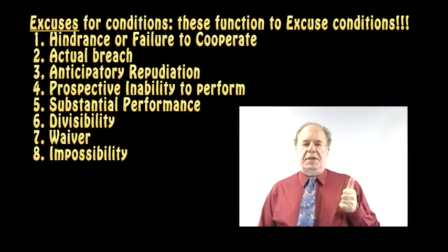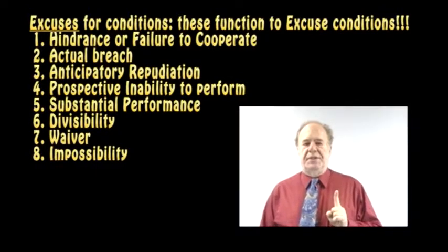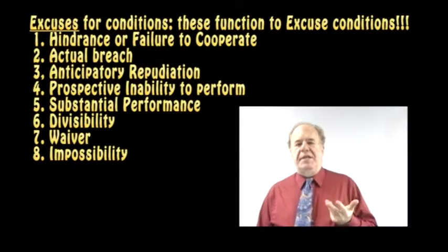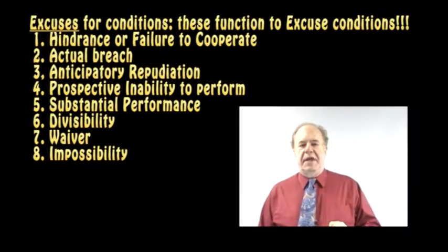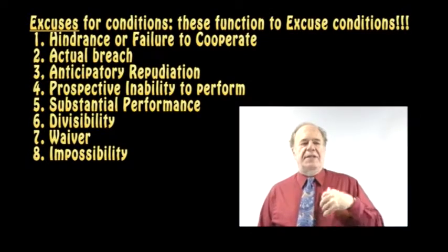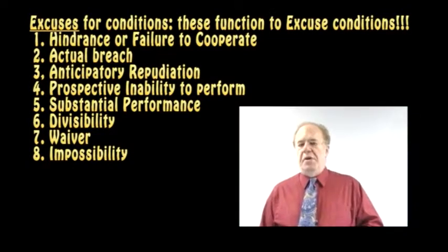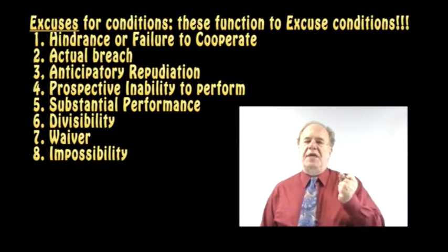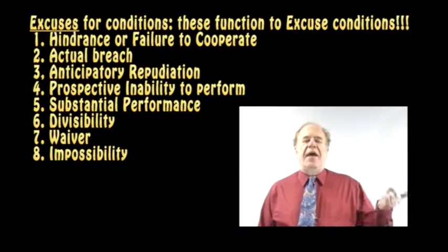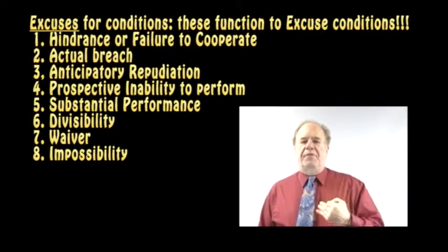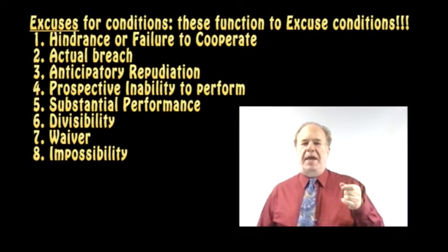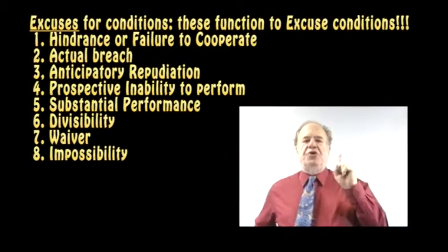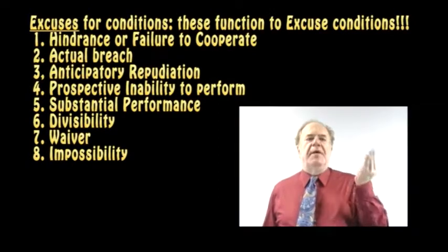But more importantly, substantial performance. Suppose the party doing the painting has done the painting but slightly imperfectly. If it hasn't been done properly, then has the condition of proper completion occurred? No. But if it's been done almost properly, substantially properly, whatever that means, then the condition of complete performance is excused and the other party has to pay with a set-off for damages on account of the minor breach. Substantial performance excuses complete performance.